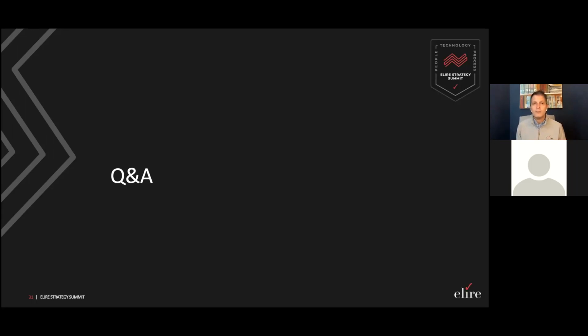And how often they should meet is really variable. They should meet more frequently early on, once the project gets going, to sort of lay the foundation. And then during slower times of the project, they could meet less. And at the end, they might meet more. So we always work on the cadence with the steering committee to make sure they understand. I hope that helps.